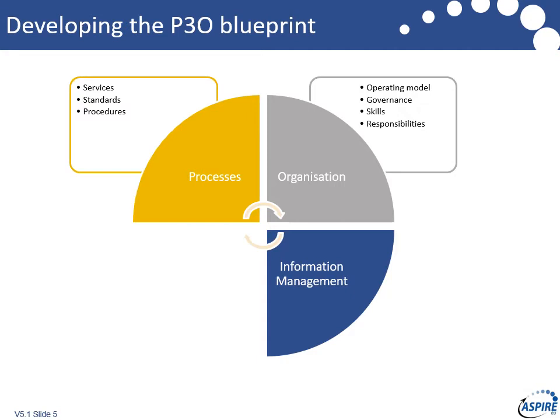Information management, well, a portfolio office in itself is all about information. So one of the big problems we've seen with rollouts is they haven't really thought about this. They've thought about processes and people and tools, but they haven't thought about the information they need at the end. So we need to think about reporting cycles. How is the data going to be gathered? What are the sources?